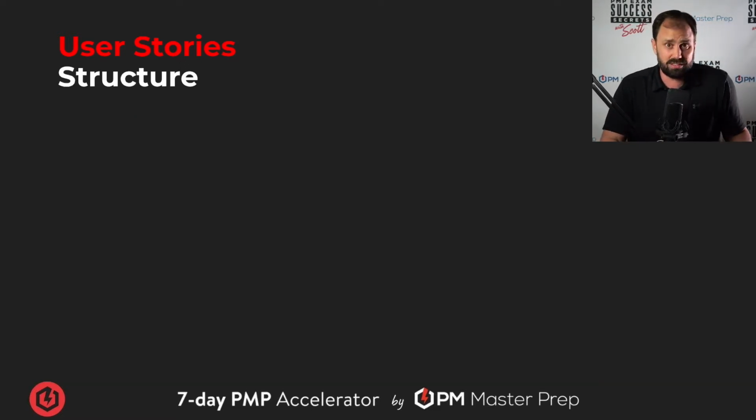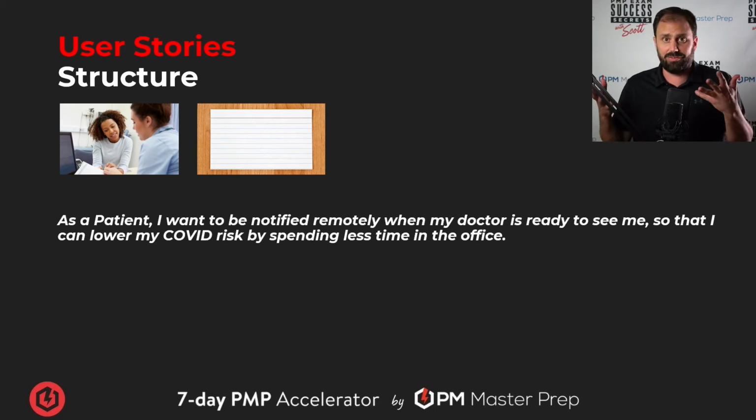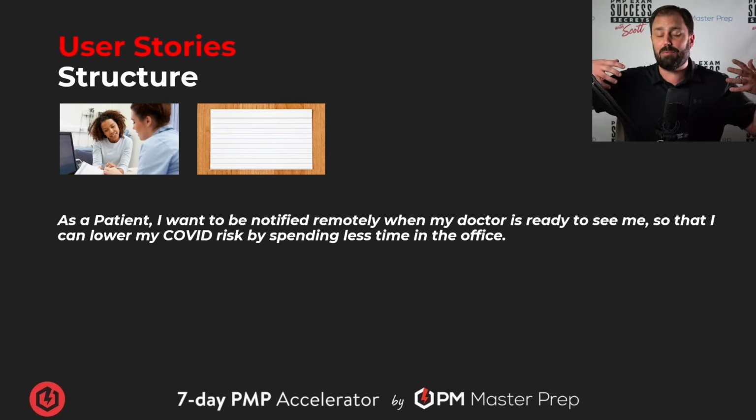Beautiful. So what's the structure? Do you just write random stuff? No. All right, so the structure here, let's just give an example. As a patient, I want to be notified remotely when my doctor's ready to see me so that I can lower my COVID risk by spending less time in the office.